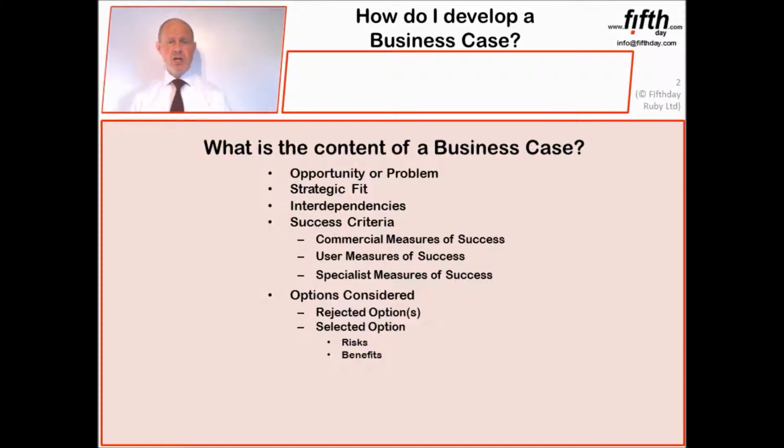We ought to be commercially measuring them. We should be describing what the value of those benefits are going to be, and in later modules we'll cover that very specifically. So too the costs. We ought to list out what we think the relevant costs are going to be, and relatively speaking they are easier to identify than perhaps the benefits. And we then have to bring them together in a cost-benefit analysis where we compare one with the other and hope that the benefits outweigh the costs.